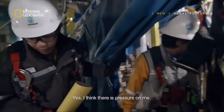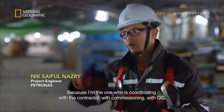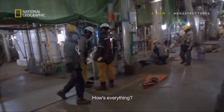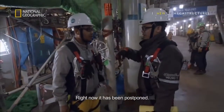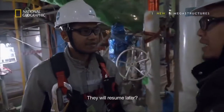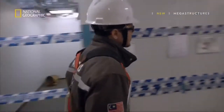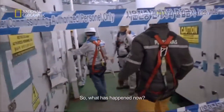Yeah, I think there is a pressure on me because I'm the one coordinating with the contractor, with commissioning, with QC, and of course the construction. Bro, how was Gigi? There's a progress today, right? Now, it's postponed. Once they receive the material, then they will proceed with the job. They will resume later. If I slip the schedule, it means the commissioning also has to postpone the work. She needs to sail on time, and it has to be a team effort. So what's happened now?